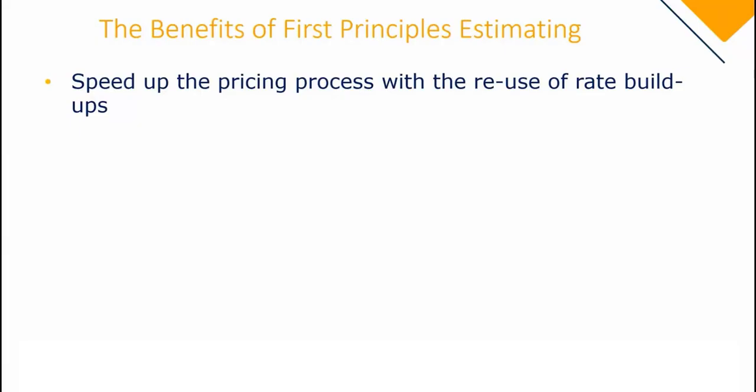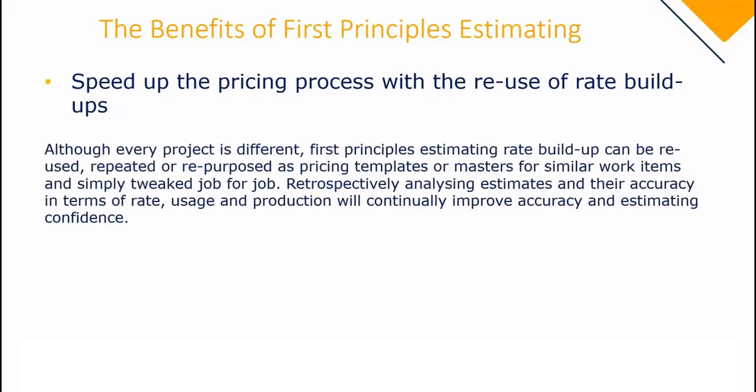Okay, so basically, based on what I showed you, you'll see how it benefited us in terms of speeding up the pricing process. So yes, although every project is different, first principles estimating rate buildups can be reused and repeated and repurposed as pricing templates or as masters, because similar work can be copied and you can simply tweak it to suit the job.